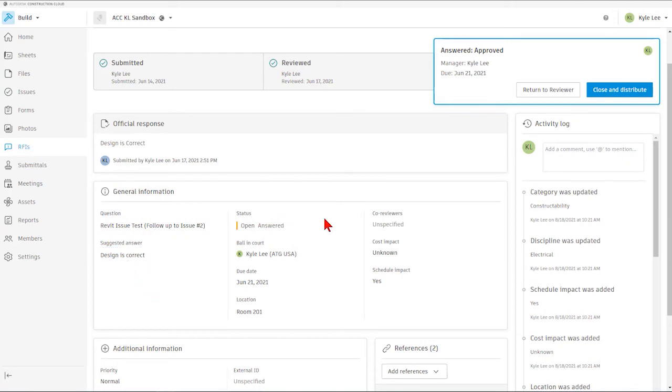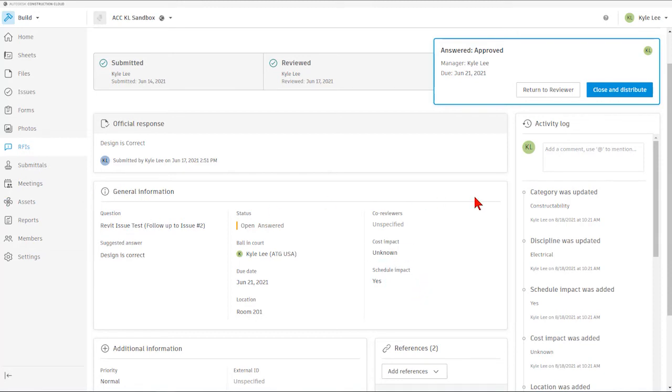We can also see the status of the RFI, who is the current ball in court holder, due date, location, also if there are any co-reviewers, cost impact or schedule impact. You can see that here in the general information as well.